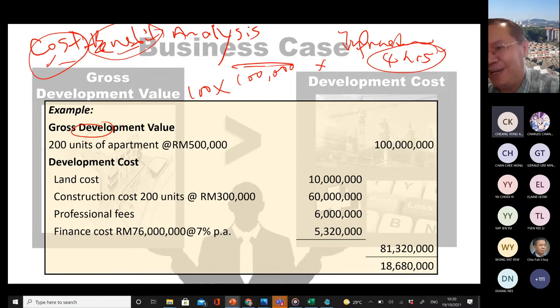If you construct the highway, it costs you 400 million. So which means in approximately 1 year's time, we can recover the cost. So the cost can be recovered due to the time saved using the road. Then you can justify this project is viable because within a year, whatever expenses can be recovered by the people using the road. All right. The government's role is to develop, to help people, to facilitate the development. So in this case, it can go ahead. Which means you have established the business case to carry out the work.